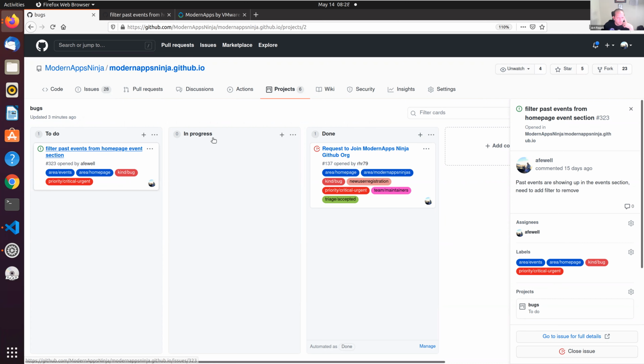You know, what exactly should be done for something to be considered in progress and to do. I need to add an icebox column for things that still need prioritization. I like to have some additional columns here for things to review. It's kind of like an on deck. I think of this to do column as like an on deck, things that we've already looked through and already decided are next in line. Sometimes things that are next in line to be worked on are all things that are priority 1. Sometimes there are things that are priority 3 that have their time.